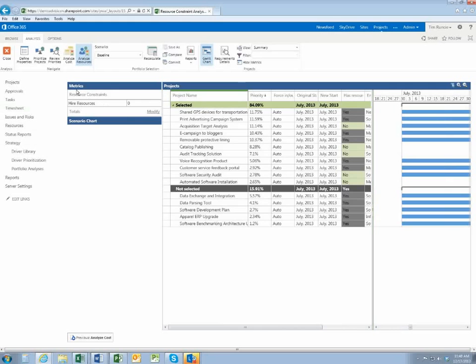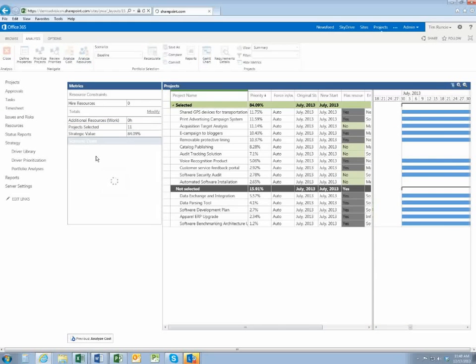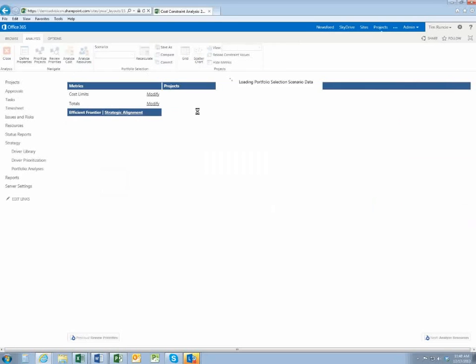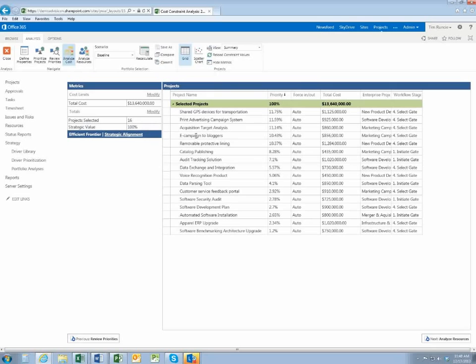It's right here. So the idea is that I can take a look at a list of portfolio scenarios, and I can rate and rank these projects as an intake process, defining: do we have enough budget to do this? What are our limitations? What are the values that we're able to work with? And then every project that we're proposing can be rated or ranked against a business driver.